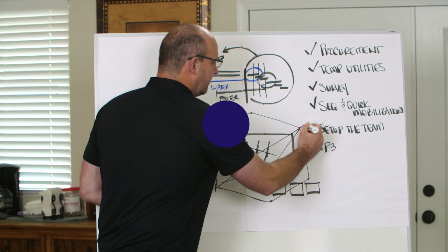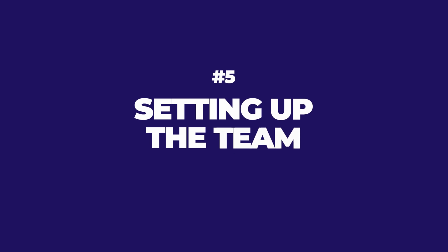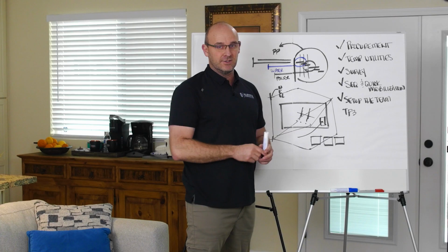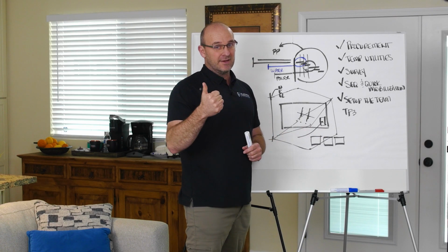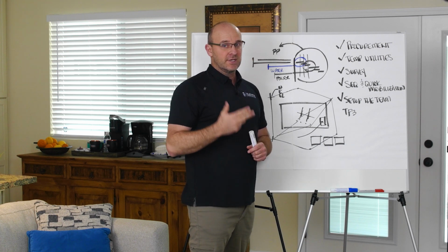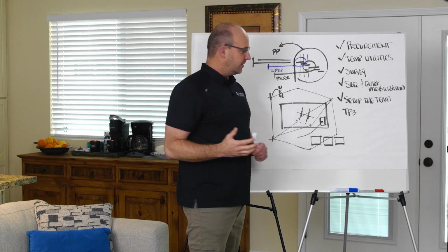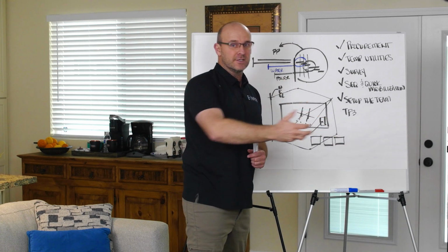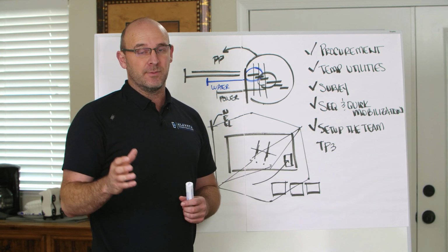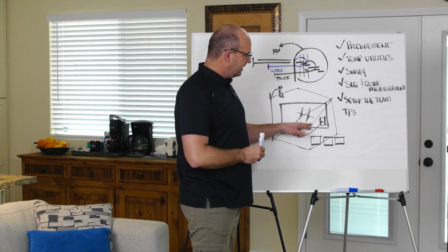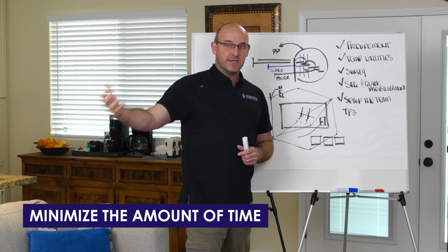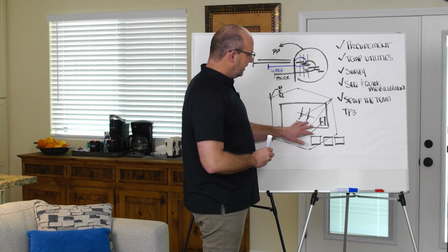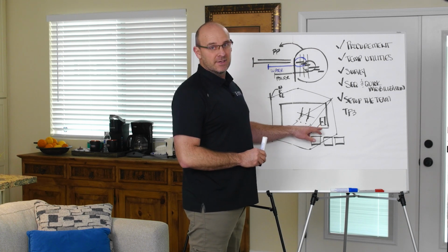Now, the other thing that I want to talk about is setting up the team. When you're on your project site, you want to get the job site trailer and your permanent team up and running as quickly as you can. So the trailer, and you might have to have state inspection on that, power, communications, furniture, your Kawasaki mules, whatever you need to get back and forth. You want your command posts as far forward as possible towards the battlefront as humanly possible, is what Patton said. And in construction, what that means is we need to minimize the amount of time that it takes the management to get to the site to lead the work and enable and support the trade partners. So get your team set up. Do not fall asleep on getting this trailer on site.